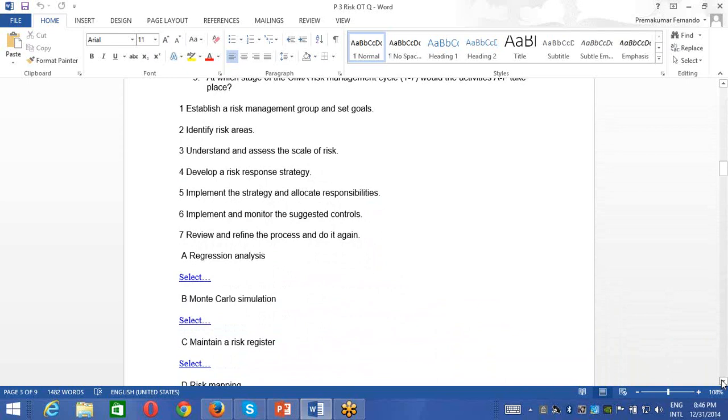So it is almost to do with identifying the risk. Okay. That is what the risk register is doing. This risk register will identify and prioritize all the risks that the organization is facing. And if possible, you will put some monetary values and also try to assign who should be dealing with the risk. So it's more of a record of the risk.